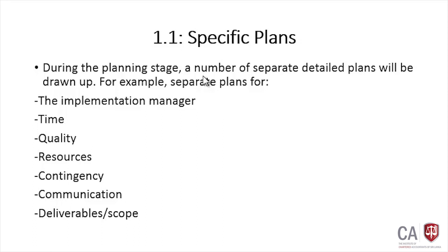time. The time plan normally lists all the activities and how long each is planned to take. Normally we identify a few activities, no? So we can identify the time for each activity within this time plan. We have to complete each activity at that particular time, otherwise, if you delay one activity that is connected with some other activities, then the whole project implementation will be delayed. To avoid that, you have to keep in line with the time target given for each activity.